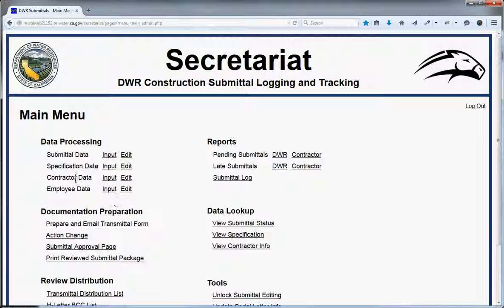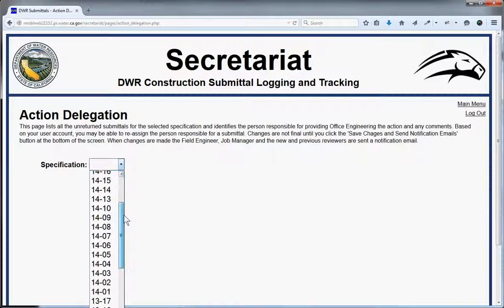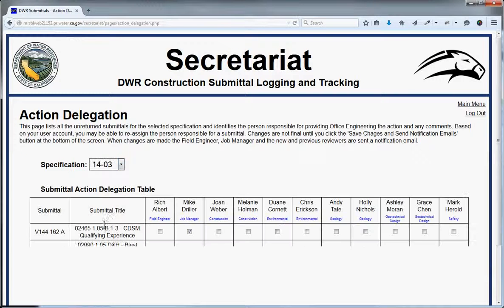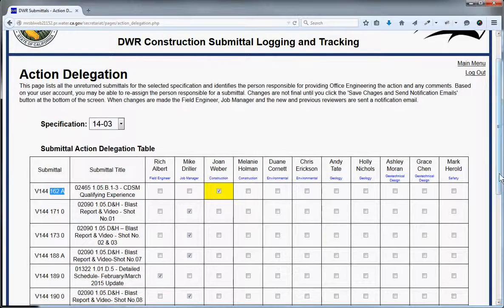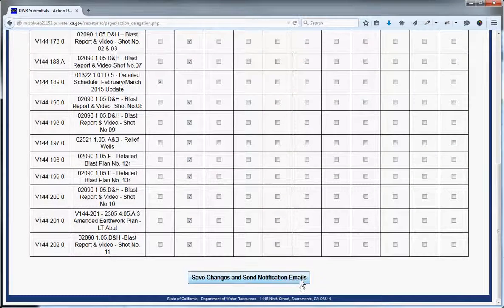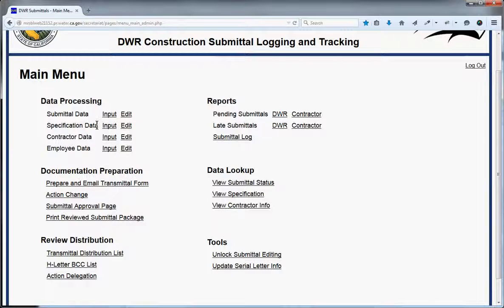The same input-and-edit pattern applies to specification data, contractor data, and employee data. For each submittal, one and only one person is in charge of returning it. Under Action Delegation for job 1403, if a submittal was originally assigned to the wrong person — say 162A was assigned to Mike but should go to Joan — you can click to reassign, then save the changes and send notification emails. Everyone involved — the job manager, field engineer, Mike, and Joan — all get notified of the change, and Joan would then be responsible for responding and assigning an action.